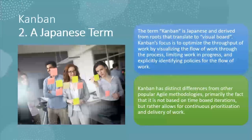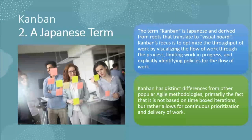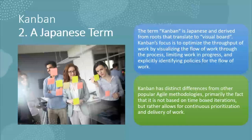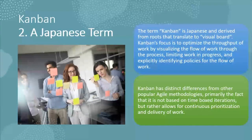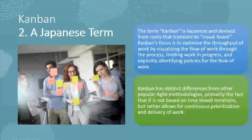Number two: Kanban is a Japanese term derived from roots that translate to 'visual board.' Kanban's focus is to optimize the throughput of work by visualizing the flow of work through the process, limiting work in progress, and explicitly identifying policies for the flow of work. Kanban has distinct differences from other Agile methodologies — primarily the fact that it's not based on time-box iterations like Scrum, but rather allows for continuous prioritization and delivery of work.